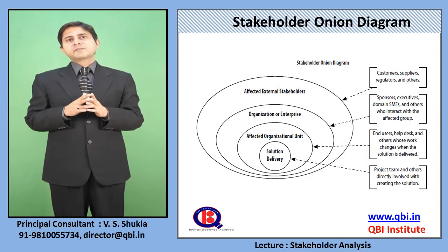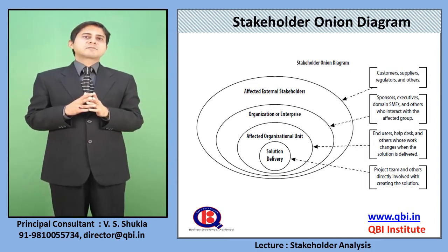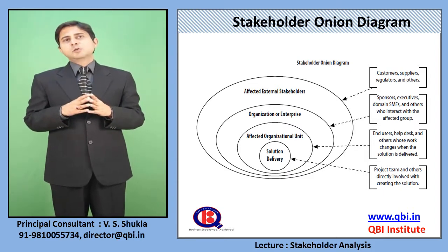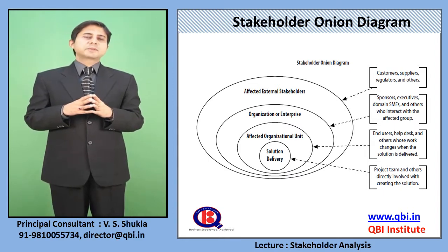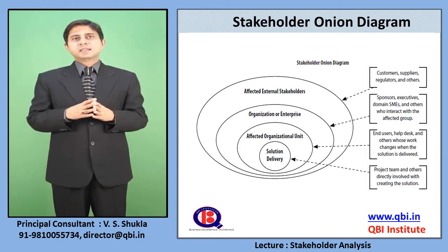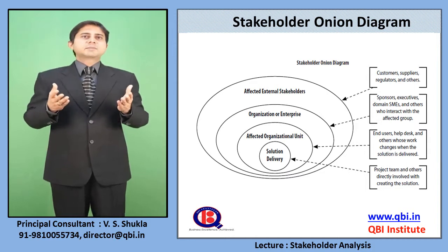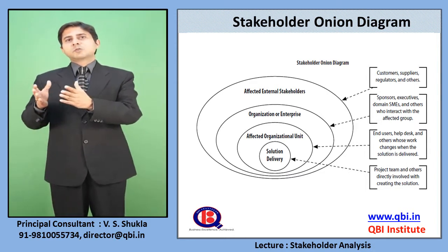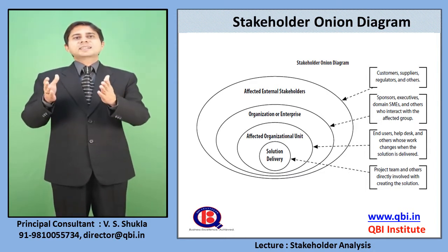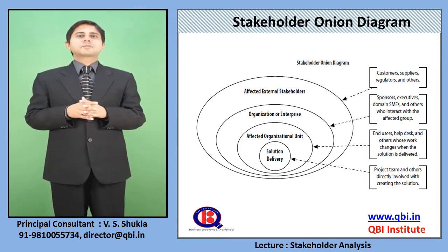Many projects have external stakeholders as well. So let us say your solution has to share information with some regulatory agency. So your reports, when they come out of the solution, they will go to the regulator. So the regulator is the affected external stakeholder for the project.